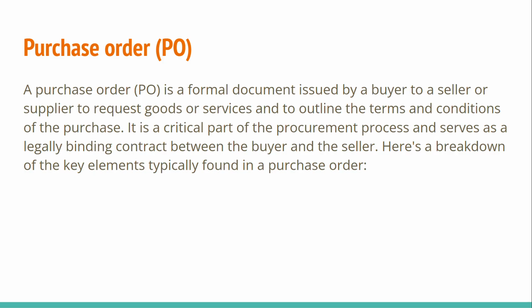A purchase order is a formal, legally binding document sent to the supplier to process material or services. It includes quantity and specifications, price and delivery date, payment terms. Example: PO for 10,000 volts at 15 rupees each, delivery within 15 days. This is a must for the supplier to the buyer.